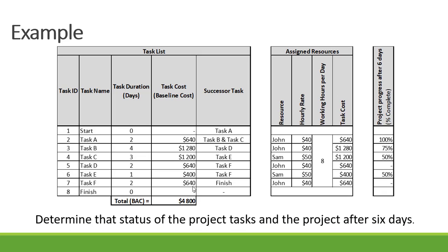Now let's determine the status of the project tasks after 6 days. Our status line is after day 6. Task A is 100% complete, task B is 75% complete, task C is 50% complete, task D hasn't started yet, task E is 50% complete, and task F hasn't started yet.